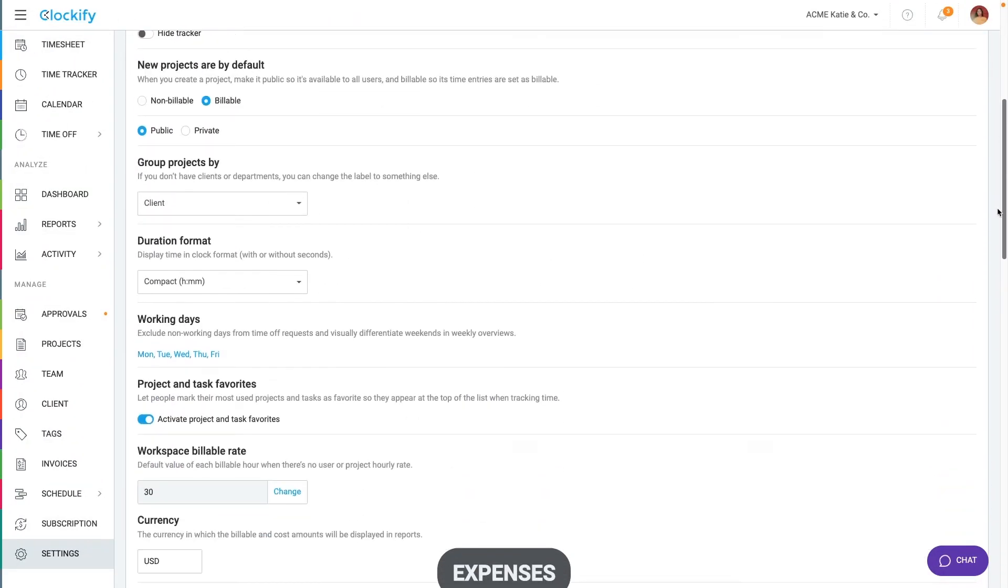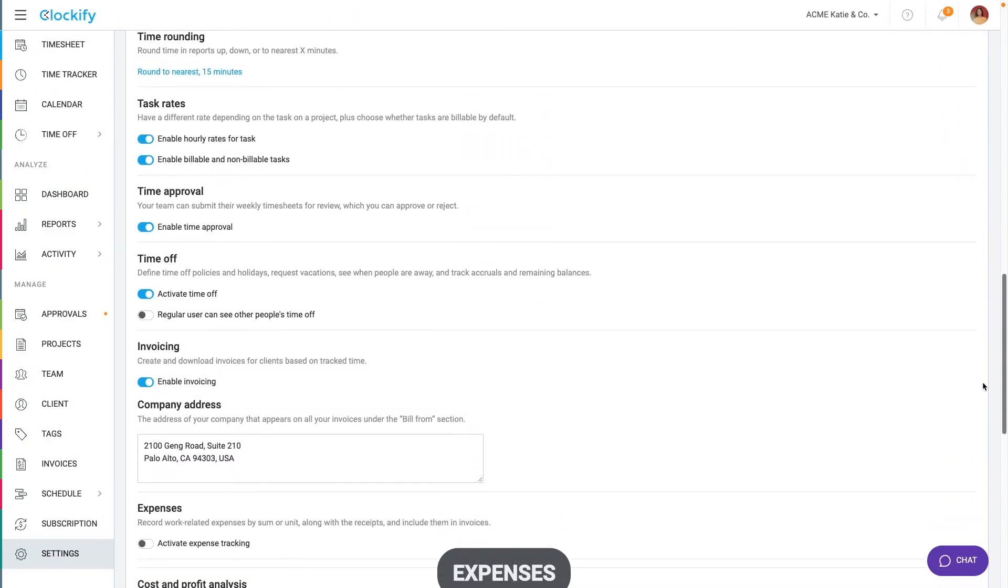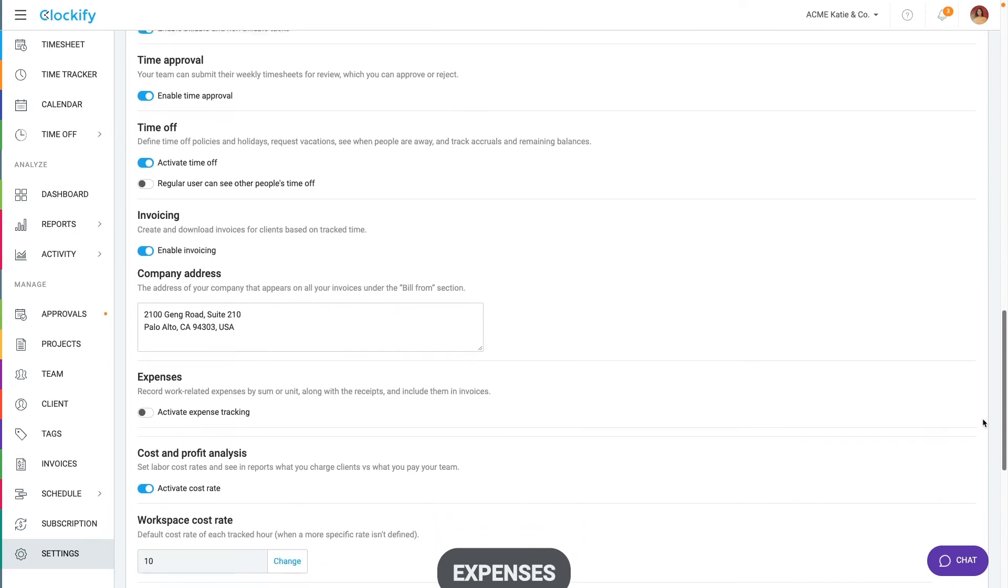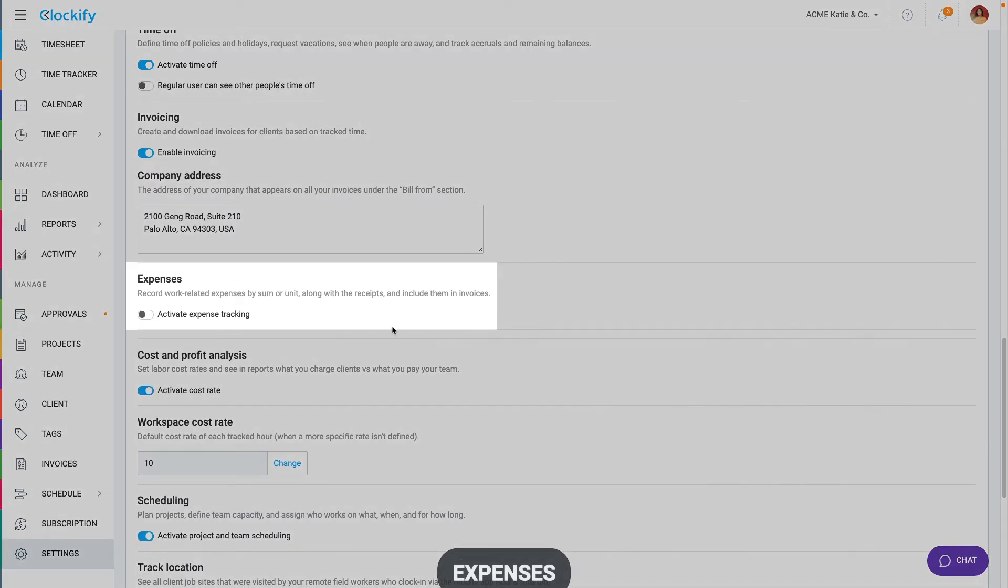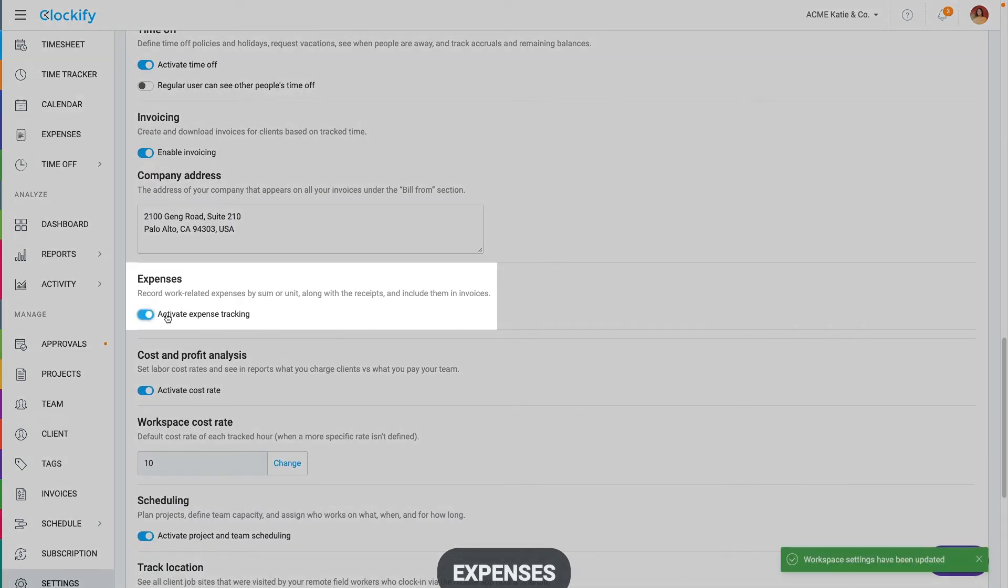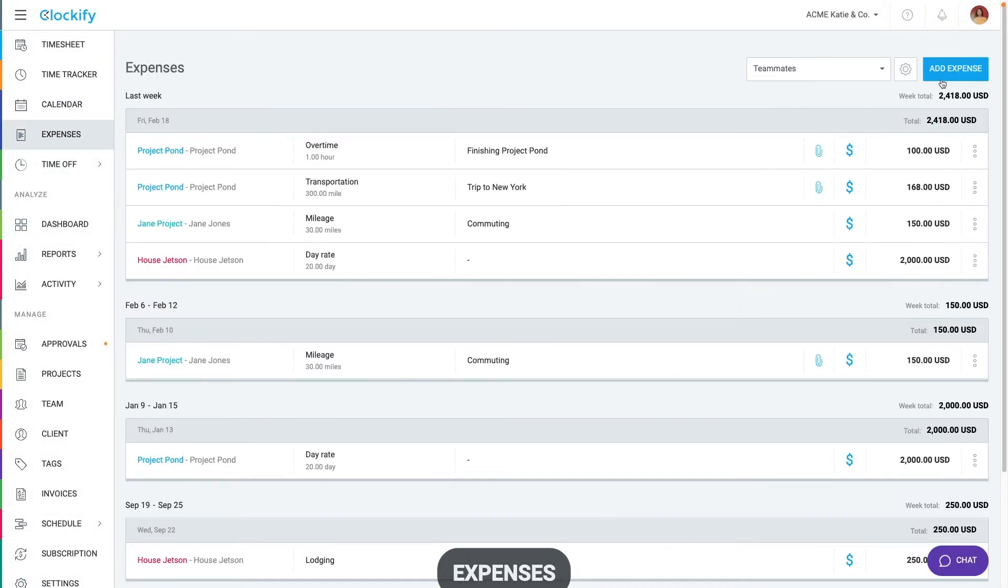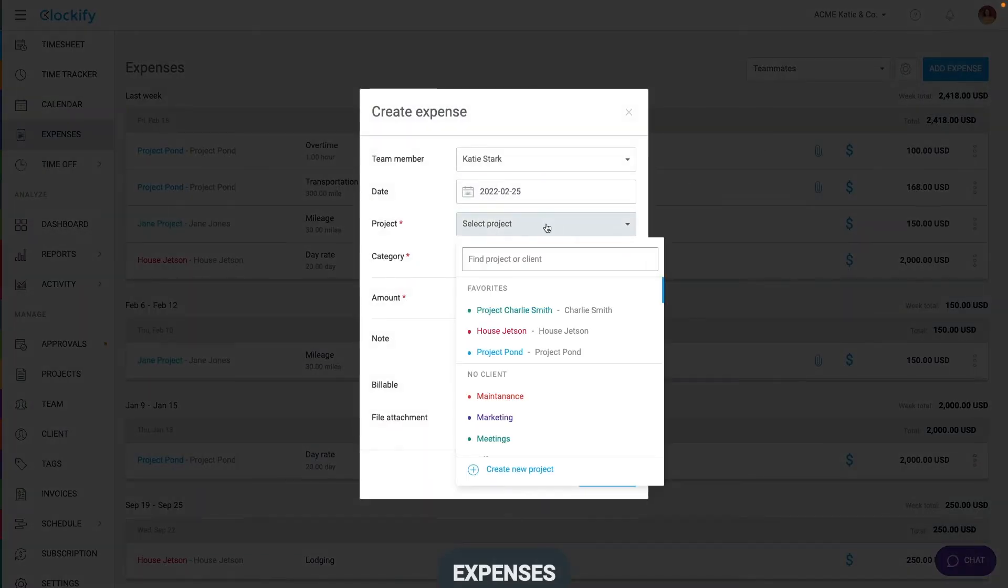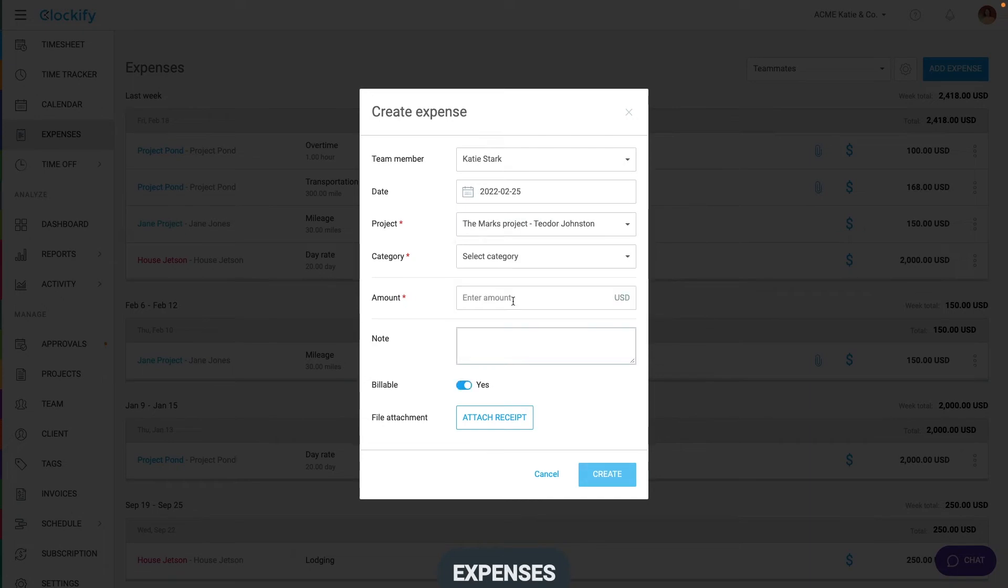Now, in addition to tracking time, you can also track project and business related expenses. Enable expenses in the workspace settings and then go to expenses page to create an expense. You can categorize your expense by project and category, enter your amount and add an optional note and attach a receipt.